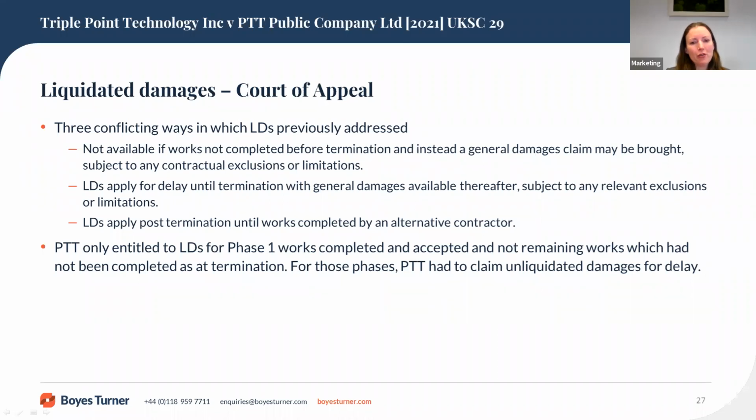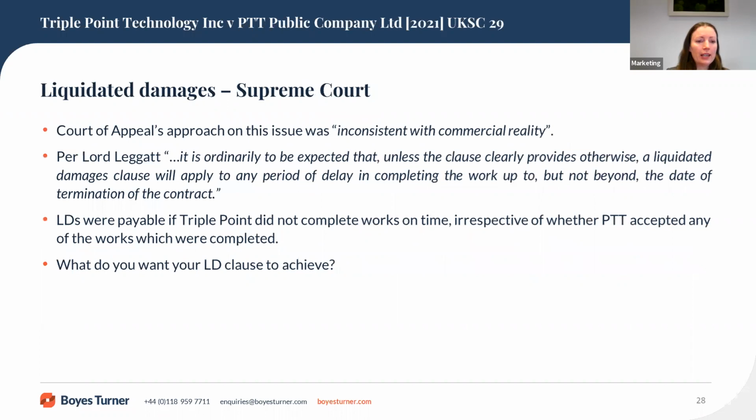The Court of Appeal therefore found that PTT was only entitled to liquidated damages for phase 1 works that had been completed and accepted, and not the remaining works which had not been completed as at the date of termination. For those phases, PTT had to claim unliquidated damages for the delay. Now, this was a step away from the orthodox approach, and it caused some disruption until the case found its way to the Supreme Court